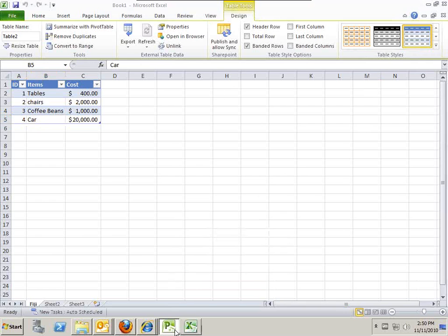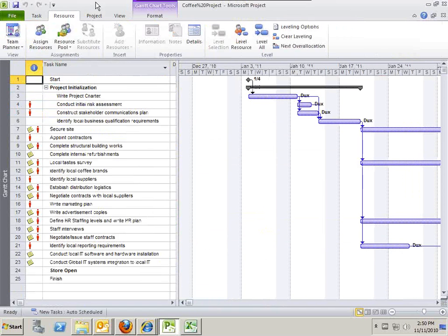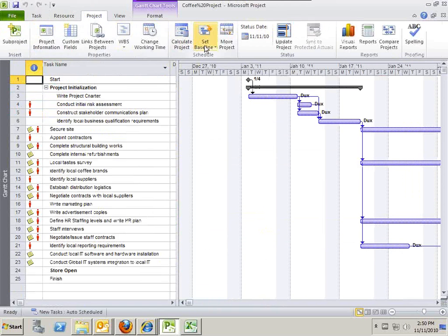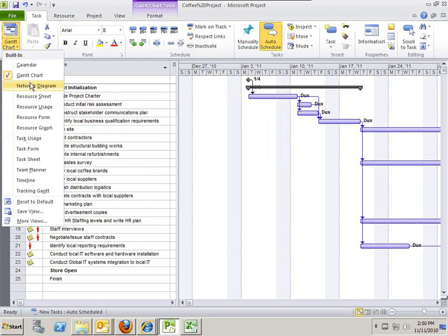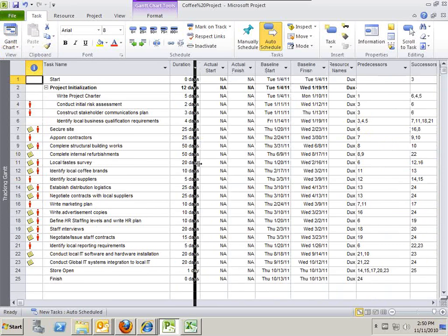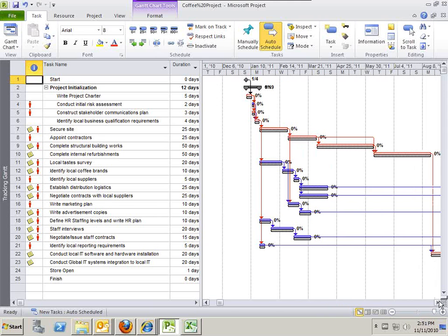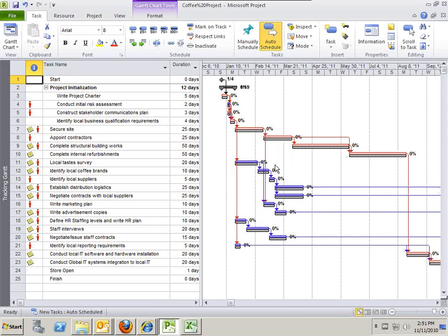Okay. So let's say the project started, and right before it starts, me as a project manager, I'm going to do a couple of things. First of all, I will be baselining this project schedule, and the idea of baselining is freezing it, saving a good copy of it, so once we start running the project, I have a point of comparison, right? So as soon as I baseline the project, if we look at this, you would see 2 sets of bars. The red bar on the top is the actual. The bottom bar is what's called the baseline. That will never change. So I have a point of comparison. So I'm going to save this just to make sure.